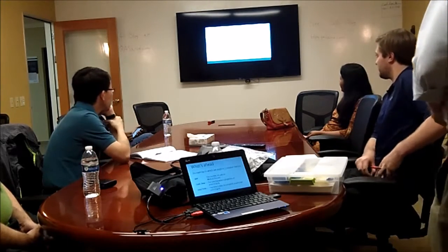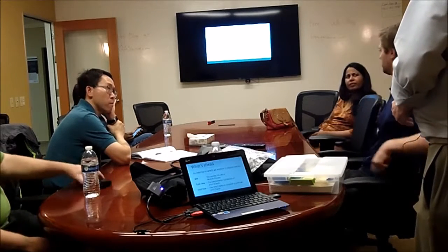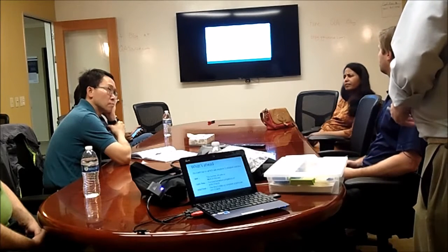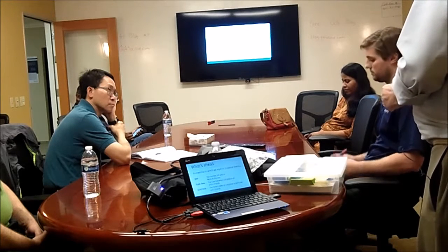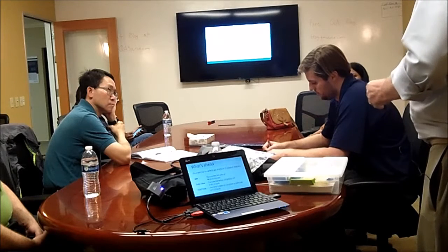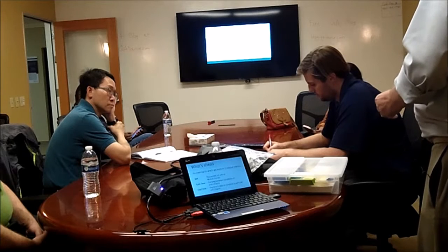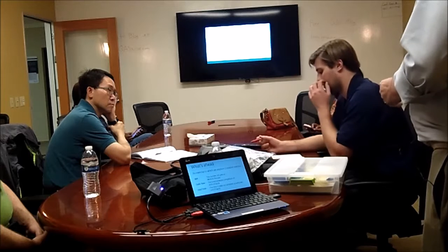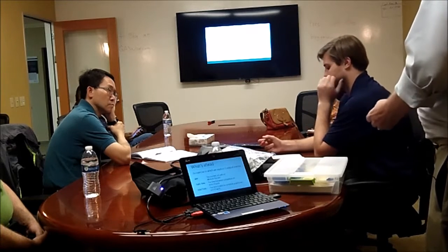Cycle time is the time it takes to complete one unit of work. Some people describe it differently and it's more confusing, but think about how long it takes to get one unit of work done, or at what rate things come out the end of your system. If you think of your system as a series of steps, whatever you're building, something physical or something virtual, look at the rate at which the things come out the end, and you'll get the cycle time.